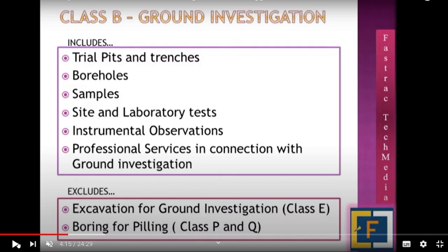Such ground investigation, what is not included in class B, we have to study in class C. There it will be clearly mentioned. Similarly, boring for piling is also a type of borehole, but that borehole is different from a piling bore.